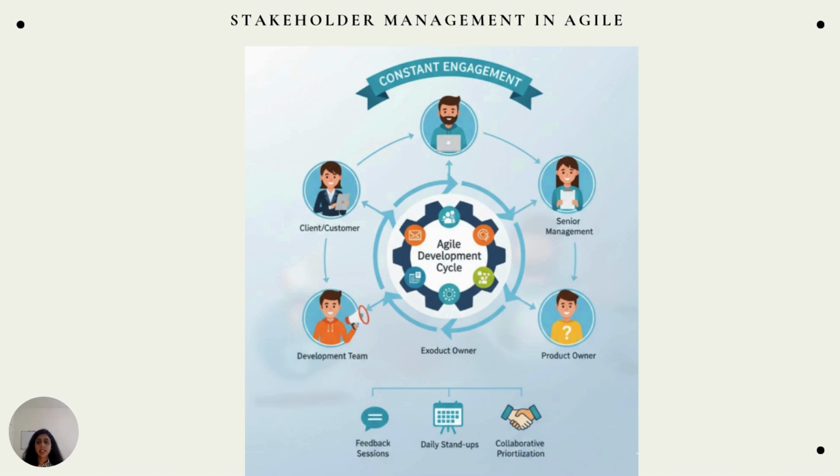Here in agile, it is broad and high level, not who will do what and the roles and responsibilities, because in agile, we believe in not directing them, but in them taking the tasks independently as contributors. It focuses on how the team will work. The vision statement, of course, team rules and code of conduct, communication rules, just like predictive. But here, the difference is we also add the definition of done, the success factor.